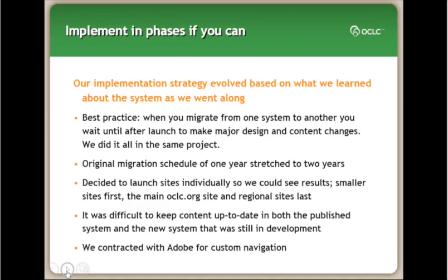Because we did put off the migration of the main site until the end, we ended up with a lot of duplicate work. We were managing the existing site in the old system, and because the content had already migrated, we had to keep that content in the new system up to date and in sync with the old one until we got to launch. And there was about 6 months of that overlap. So there was an awful lot of work there.